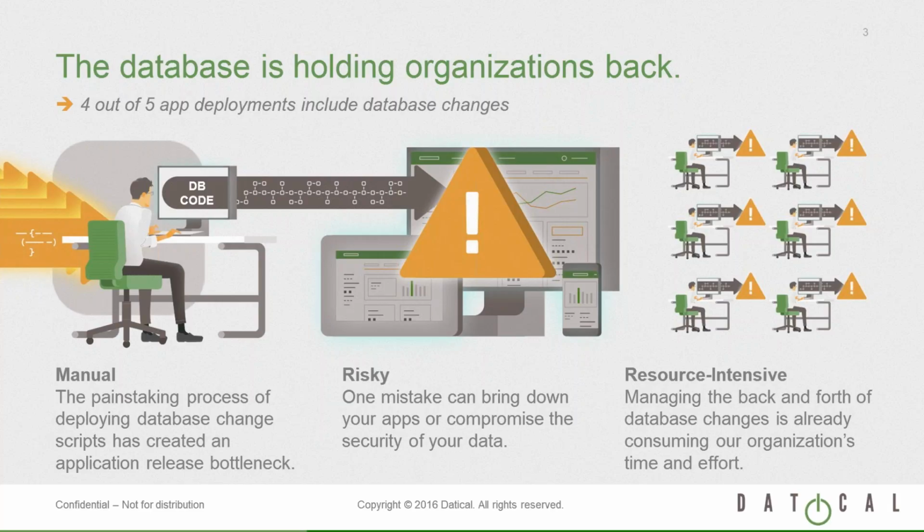So if you look at a 2-day SLA in the context of a 2-week sprint, which is 10 working days, you're looking at 20% of your sprint time waiting on a single database change. So if you have multiple database changes in that same sprint, you could spend a lot of that development time waiting for those changes to come through. And unfortunately, state of the world now, that's a very necessary exercise.